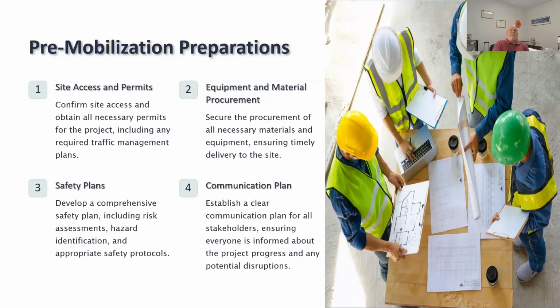As I mentioned earlier, you're not going to go to a supply house and buy this cooling tower. These are typically multi-week, 12 to 14 week delivery items, depending upon the size. Smaller ones we can get a little faster, but the bigger the towers and the more specialties that they have, the longer it takes. And you're not going to be able to order it until the contractor is selected and you're able to get submittals from the contractor's vendors to review and understand what they're putting in.